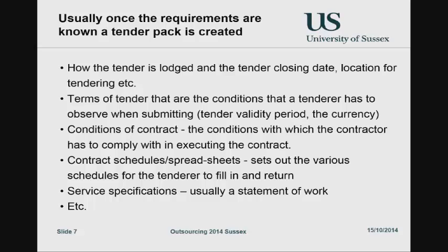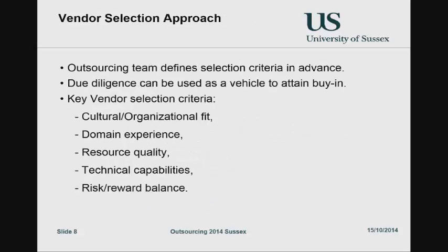So you want to constrain them into a way that you can objectively evaluate against several potential providers. And to do that, you standardize things. Standardizing things is good. It saves time later on. Service specs, statement of work, and all the usual stuff. Those are the major components you need to think about to put together. Sounds like a lot, but when you're talking hundreds of millions of pounds, this is no big shakes, yeah?